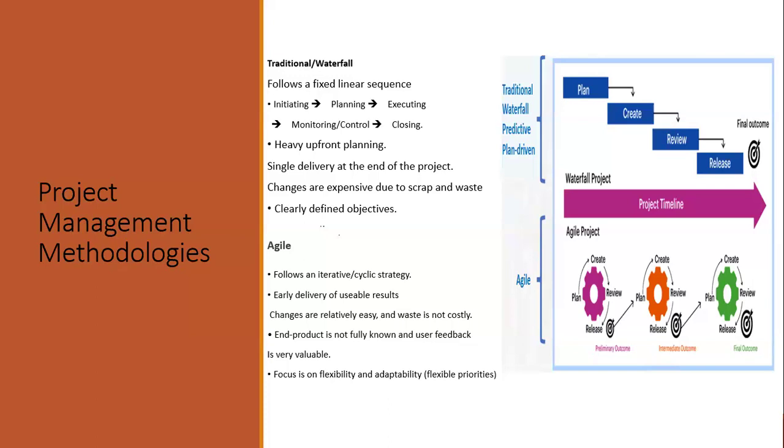So in waterfall projects, change is very expensive, because any changes you make may lead to discarding the previous thing you designed, right? So that is why it's this way, and it has a clear objective. Like I said, you must know everything that you need to know about it, and you can also use it for simple projects, not too complex, right?